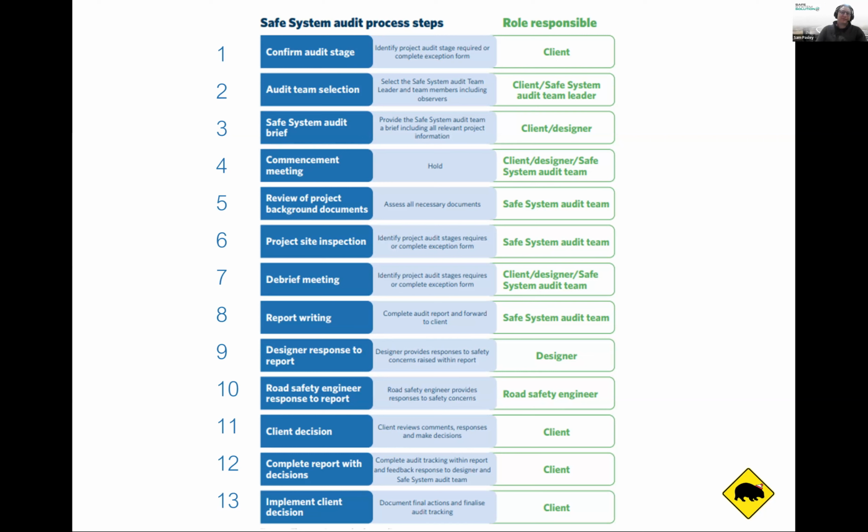So yeah, quite important in the guide that the client actually independently contracts the audit team. And so that's a recommendation, or at least chooses the team lead definitively. So it shouldn't be chosen by the design team. So you've got to maintain that independence. That's the main part there.